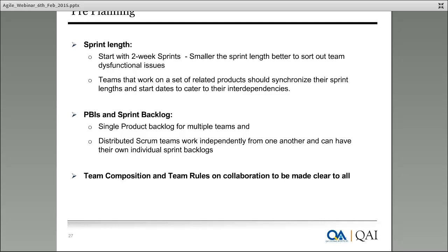If the time zones are so challenging, especially if you are working across India and US time zones, there could be a challenge in getting 4 hours together. In such cases, it is a good idea to break the sprint planning into 2 parts. In the first part, the product owner and scrum master can use a screen sharing tool to display all the product backlog items, provide the required clarifications, and explain the goal, what needs to be done, what the user story is all about, and expectations in terms of its functionality, acceptance criteria, and definition of done.